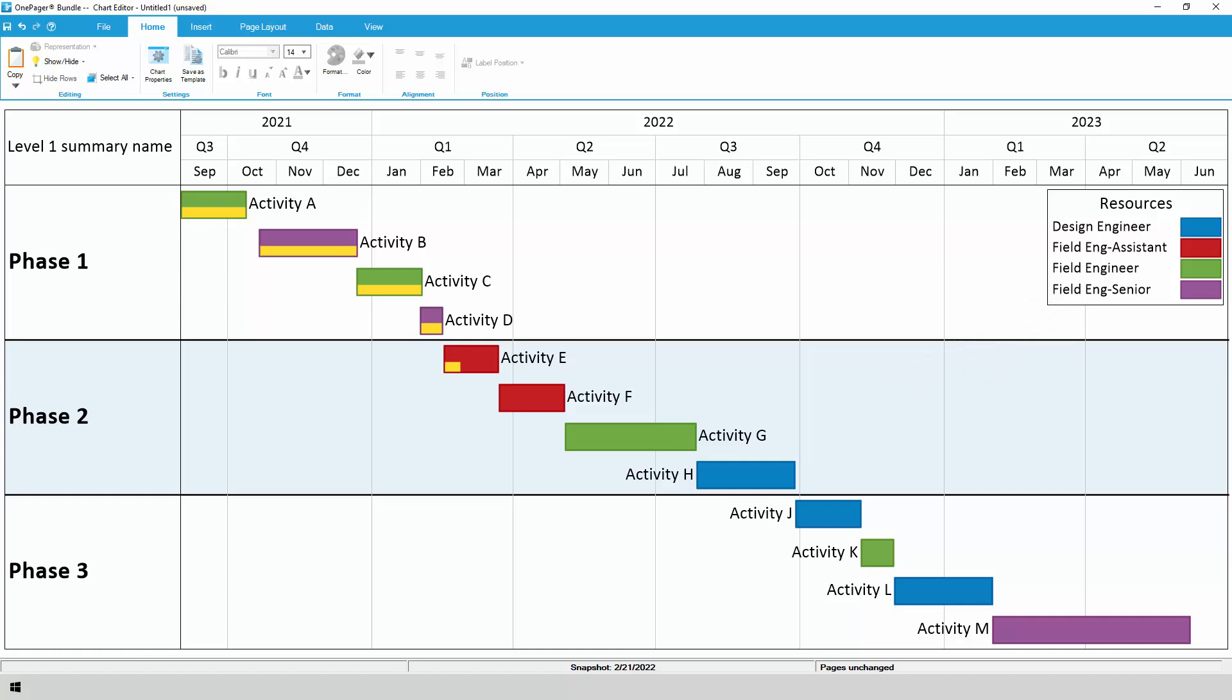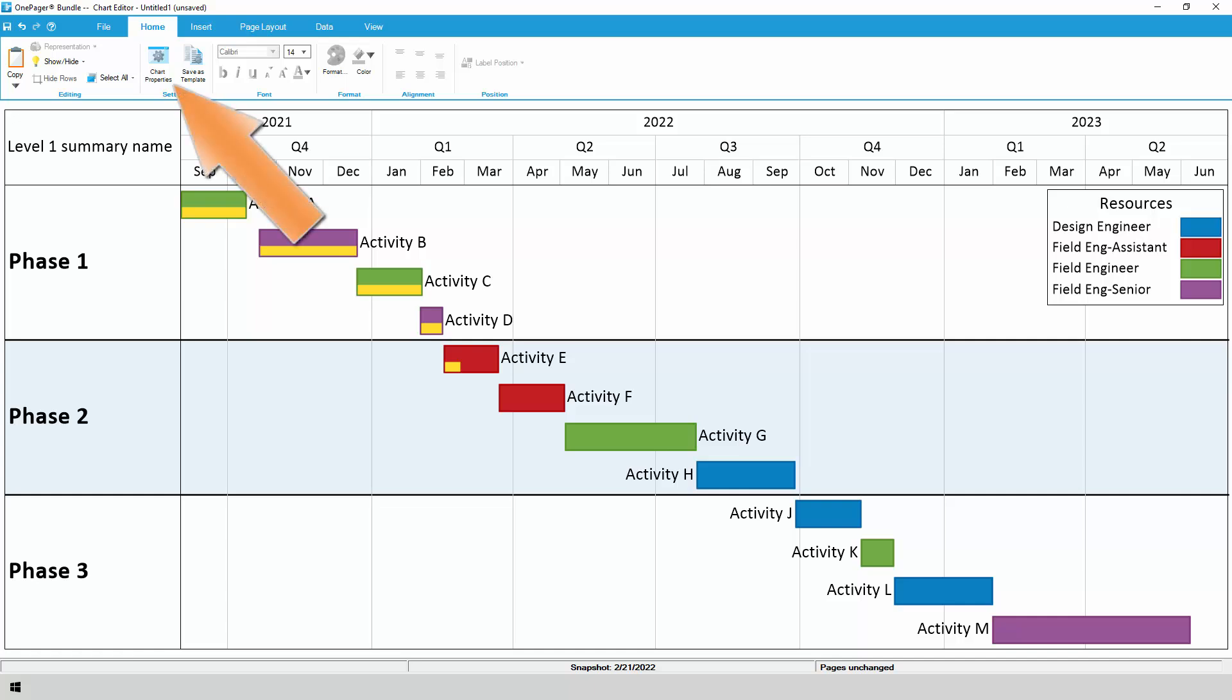If you're looking to group your swim lanes by a different field, add a secondary swim lane grouping, change your layout from a Gantt chart to a timeline, or maybe color code by activity status or some other field instead of the resource, you'll find that you can modify hundreds of different settings using the Chart Properties button. You can also make minor drag and drop edits in the body of your chart using the toolbar. When possible, we strongly recommend customizing your chart using the Chart Properties button, since these edits will be more directly tied to your Primavera P6 activities and WBS, and will be easier to standardize later.